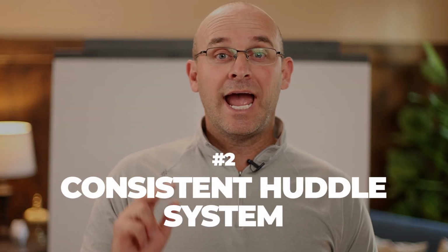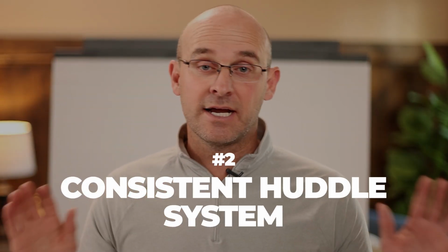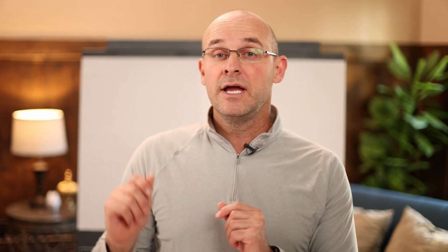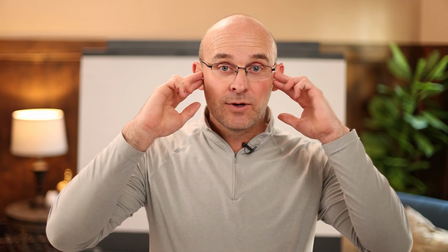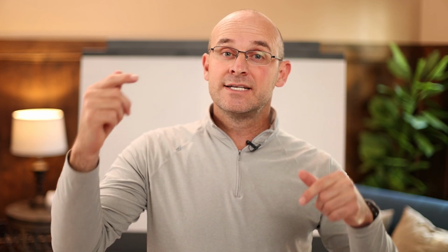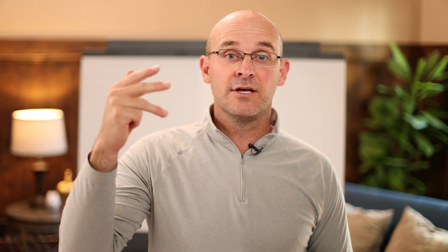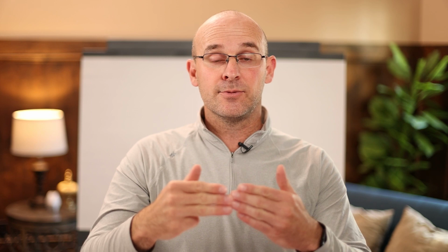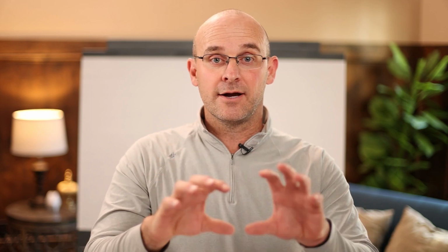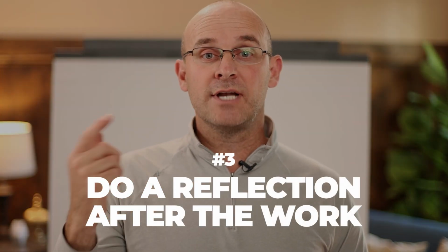Number 2, have a consistent huddle system like I've talked to you about in other videos. That means your afternoon crew leader huddle and your morning worker huddle. Planning and preparing work and getting real-time feedback from the crews to see if you have waste, unevenness, or overburden, so that you can see as a group, know as a group, and act as a group and fix it right then and there.